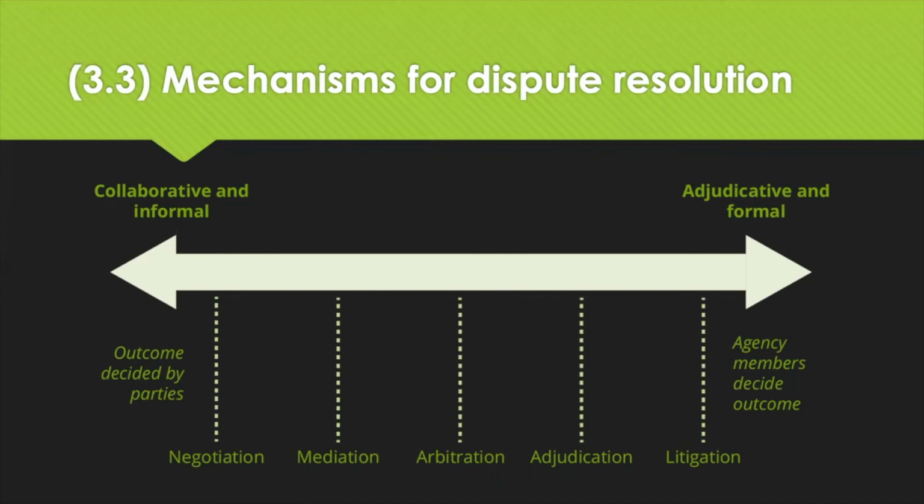In consensual methods, a third party is introduced to facilitate the process of reaching an agreement. And adjudication methods are where the third party acts as judge or sole decision maker in relation to the outcome of a dispute and how it's resolved.